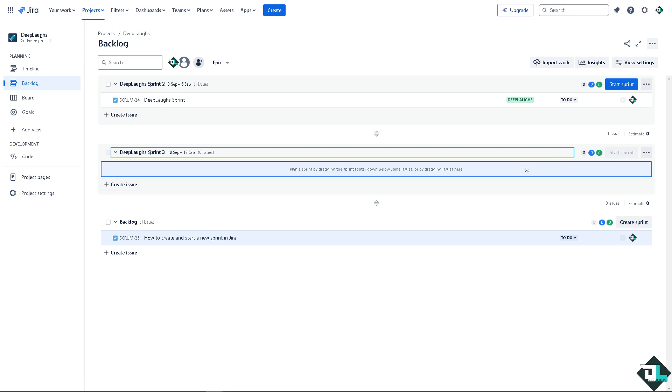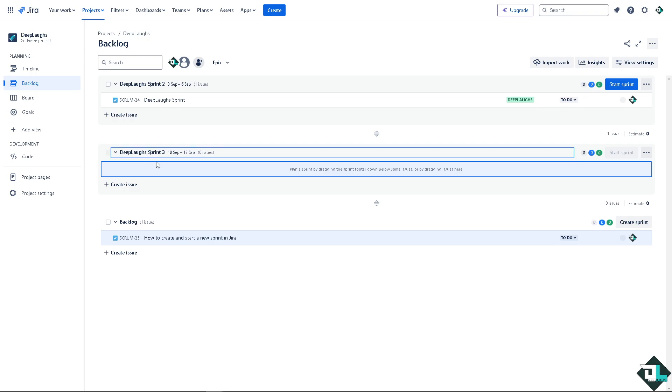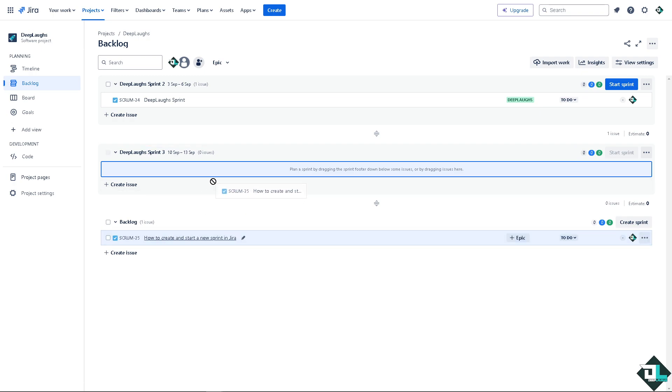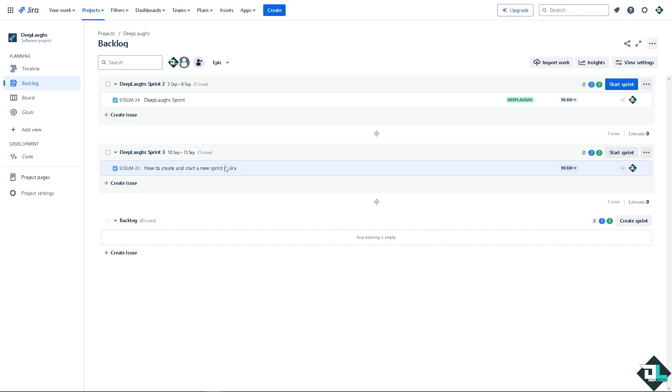Now, when you create your sprint here, you can plan a sprint by dragging the sprint folder down below some issues or dragging them here. Okay, see that? That's one way.